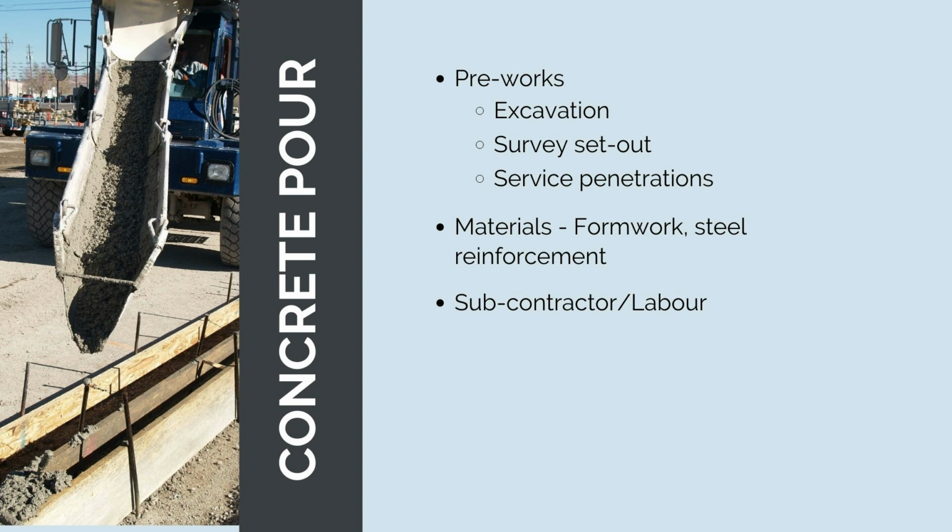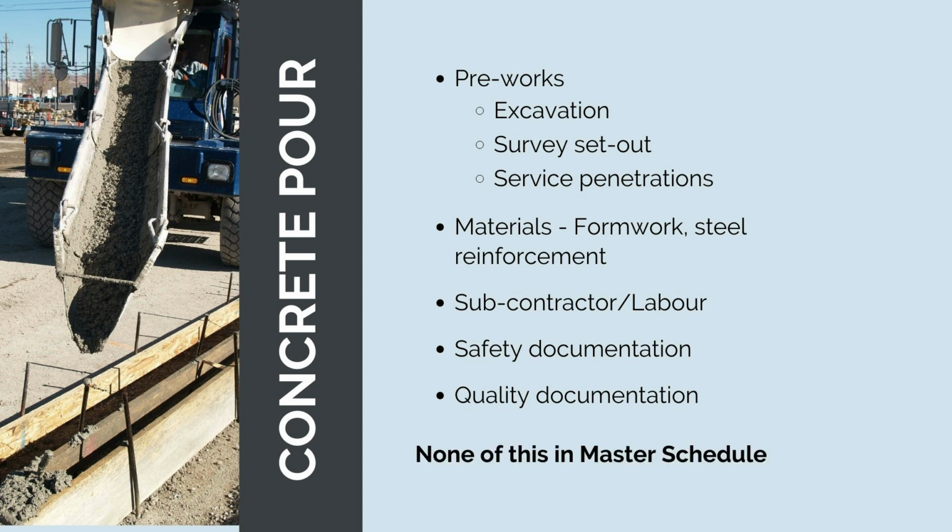We also need all our safety documentation in place. So we'll need a SWMS or a safe work method statement for the task that's been prepared and reviewed. And then we'll need quality documentation. We'll need to have prepared an inspection and test plan to cover the activity, and we'll need our clients to review it. None of this is going to be in the master project schedule.